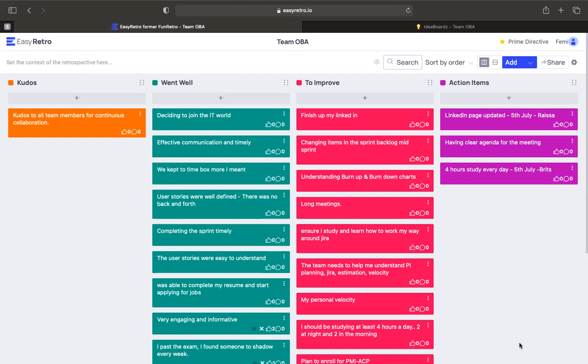So someone like Sean now, you say you want to plan to enroll for PMI ACP now. So Sean, what's your action item, right? You talked about what you want to do, but if you don't give yourself a time box or the timeline of when you want to get this started, it's just going to be all talk. And one thing about action items is the next retrospective we have to come back to this action item.